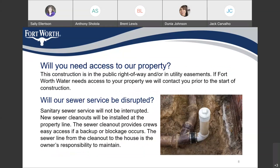Will you need access to our property? This construction is in the public right of way and/or in utility easements. If Fort Worth Water needs access to your property, we will contact you prior to the start of construction. Will our sewer service be disrupted? Sanitary sewer service will not be interrupted. New sewer clean outs will be installed at the property line. The sewer clean out provides the crew easy access if a backup or pluggage occurs.